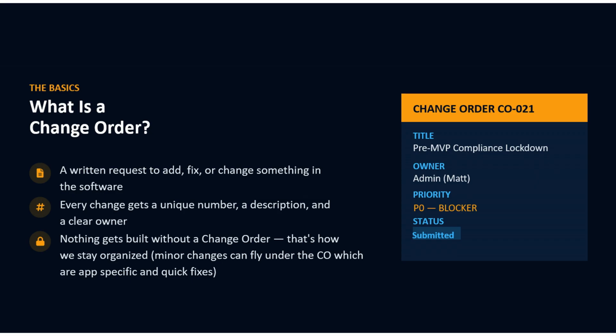And not every single change is going to be a change order. If I want to change a button or a color, or add some text to a message for the end user, little minor changes can fly under the change order process. But for the most part, when you build something out and you want to capture everything that is going to make the software really work for the end user, you're going to submit a change order.